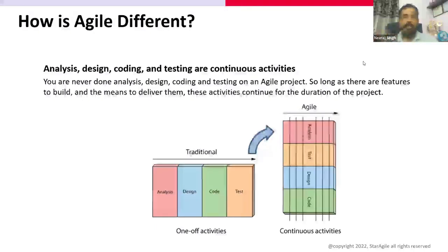Now, there are several things which we can talk about in more detail: what is a sprint? What do we do about it? So a sprint is a short iterative cycle which picks up a certain set of work items together and then tries to implement only those items in a bi-weekly sprint or iteration, and then delivers it to the business, presenting how your product is going to work. Then the customer has visibility right from the very first sprint, that means the first 2 weeks of the project, of what exactly the product is expected to do and how it is being built.